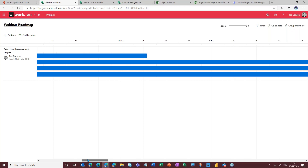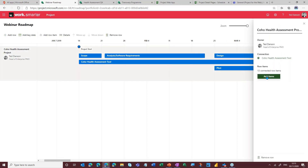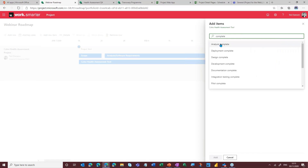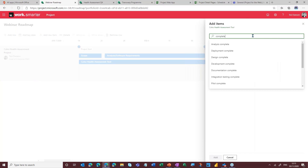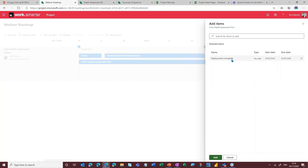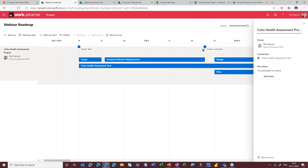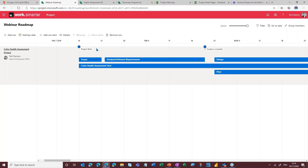Going to refresh the page now, and as if by magic we should hopefully see the entire plan being displayed on the page. And there we go. So these are all of the tasks that we've just brought in from this particular project. I could also go in and add milestones, and I'm going to do those by searching for them manually — looking for things that are titled complete. We'll add in the analysis, and I could also go in and add a few other items. We'll also bring in the pilot complete, and we can add those in. So now you can see the roadmap being displayed.